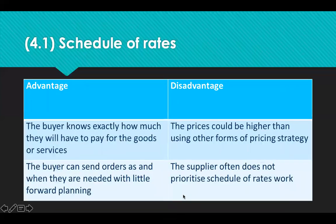Let's look at schedule of rates. Kasia can't decide if she wants carpet or laminate flooring in her flat, but she knows the maximum amount of money she can spend. She asks a local floor fitter to supply a schedule of rates so she can compare prices per square metre for materials and fitting of the two different methods. The schedule of rates helps her decide because she can see the price per square metre and compare costs easily. The advantages are that the buyer knows exactly how much they will pay, and can send orders as and when needed with very little forward planning. But the downside is the price could rise and could be higher than using other forms of strategy, and suppliers often don't prioritise schedule of rates work over those paying a much higher price.